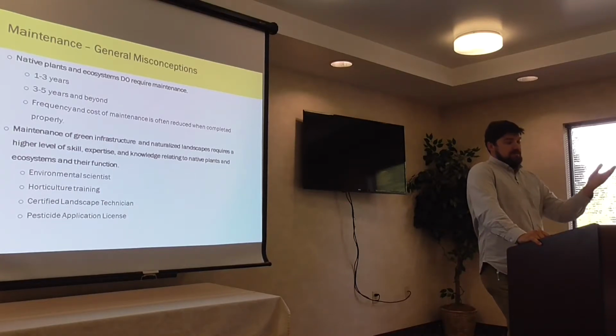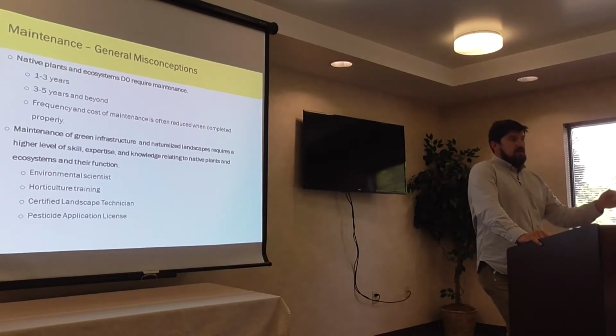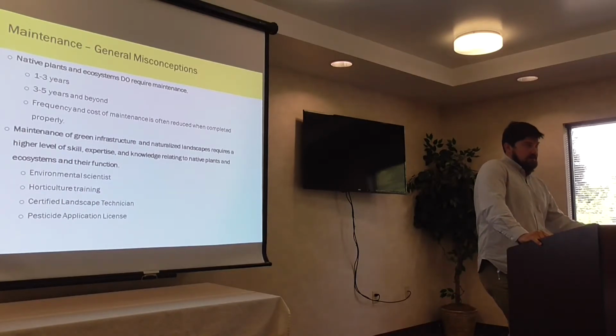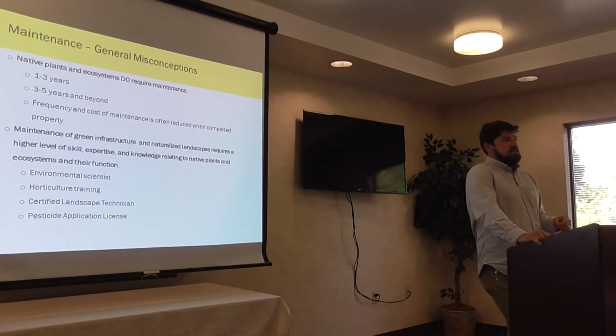Because on the same site, with all these different contractors, they refer to the field as the location of both the meadow and these trails that we've established. So they'll call me and say there's weeds in the field. In the meadow, or does the grass need mowed? So we put a plan together, and now they call and say the trail needs mowed, the meadow has this on it. And now I know exactly what they're talking about, instead of driving out to the site to find out they need to call the guy that mows the grass.